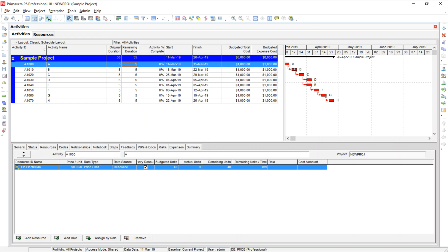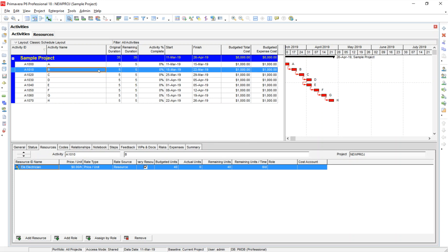So we're going to be okay for all of these activities that are butted up to one another. However, these two, D and E, that run simultaneously, we're going to have a problem because my limit on all of these activities is an eight-hour day, and I'm going to be over-allocated during this time period. So let's go ahead and take a look and see how this appears.